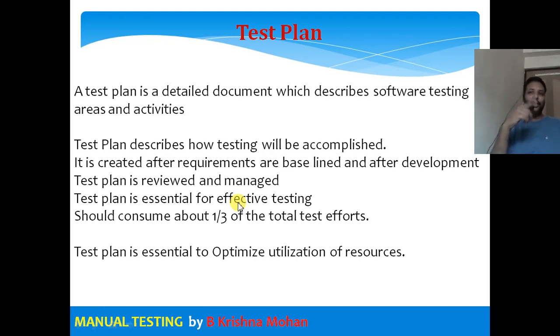Whenever I change the plan, I change the document version, so it is known as controlled. Configuration management comes into the picture. Every document is controlled, but why is it managed? Because you should not say, how many times will I change that? It should be managed, closely watched by the management people. If any changes are done, they should be reviewed and approved. Even if baselining is not done, changes have to be reviewed and approved.